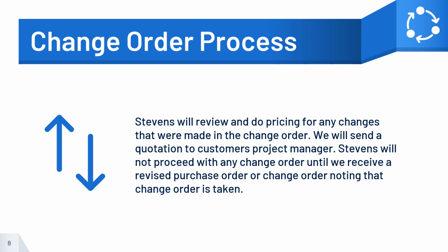When the customer receives change orders, the customer is required to send Stephen's Project Manager only the important documents that pertain to any changes to Stephen's casework. Stephen's will review and do pricing for any changes that were made in the change order. We will send a quotation to customer's Project Manager. Stephen's will not proceed with any change order until we receive a revised purchase order or change order noting that change order is taken.